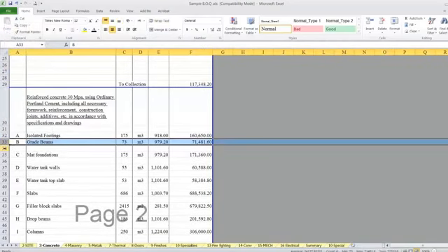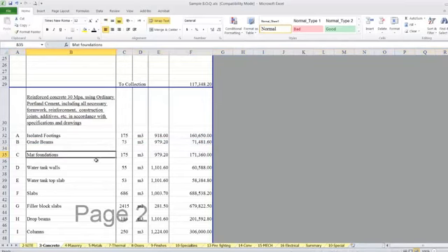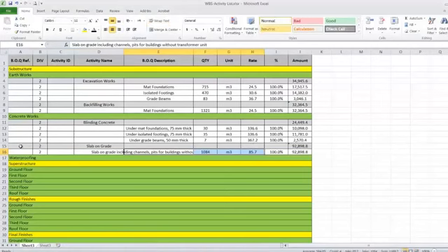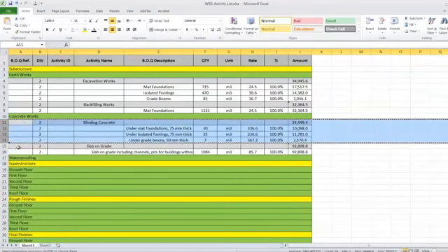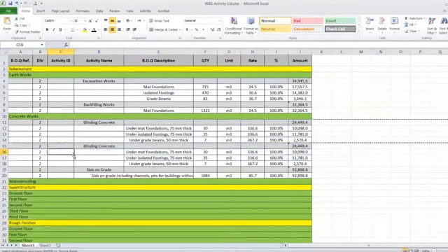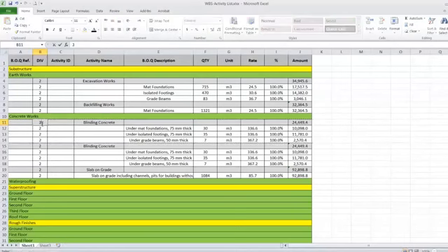We have grade beam, we have mat foundation. So the grade beam usually comes after the isolated footing. So the first thing, I'll make footings in my, this one. I think it's more than 3. I'll copy this one. I put it before, trying to make the sequence. This all should be 3, by the way. This is division 3. So here I'll call it RC footing.